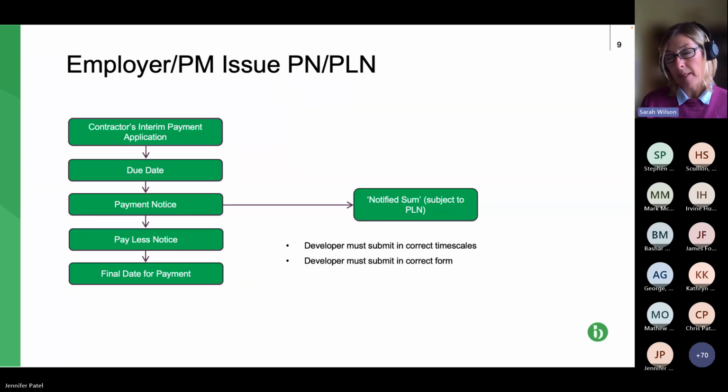So that would go in your pay less notice. Or you might forget, as a contract administrator or contractor in a subcontract, to serve your payment notice, and in that case you get a second bite at the cherry with the pay less notice. Now, of course, the 2 bullet points apply, as we've seen. It must be submitted in the correct timescales and in the correct form, i.e. stating the basis of calculation and the sum due.